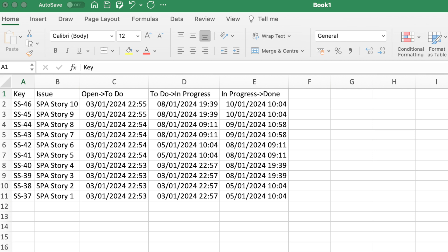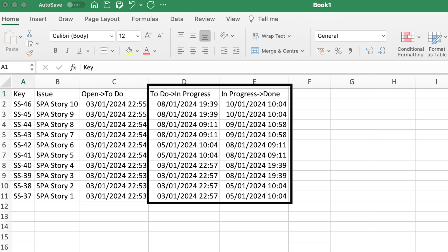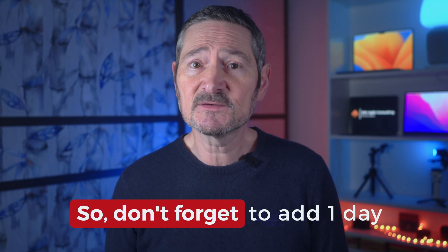The only two columns we need are the dates our stories entered In Progress and Done, because those are the statuses we're using for our start and end date in cycle time. So you can delete the other columns — this is all you need to calculate cycle time. You simply subtract the date in the Done column from the date in the In Progress column and add one day. You add one day because we want to count every day the item was worked on. For example, when an item starts and ends on the same day, we would never say the story took zero time to complete — so we add one, effectively rounding the partial day to a full day.